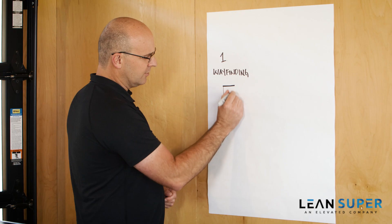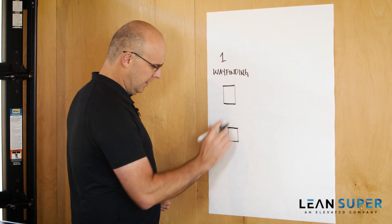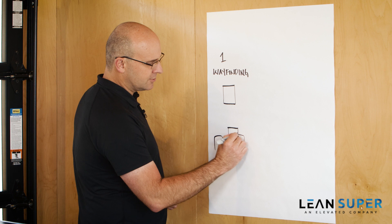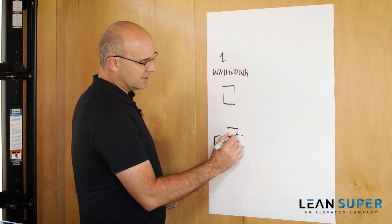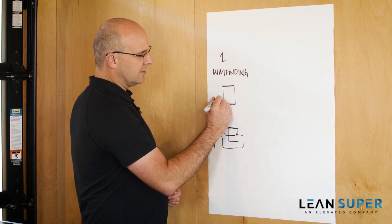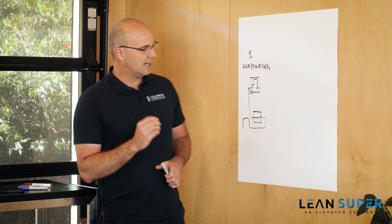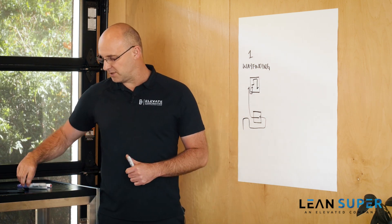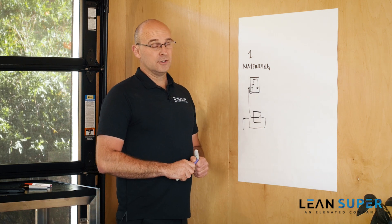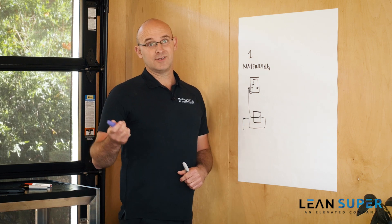The key is to get your workers to the place of work as fast as you can. If you have your job site and then off-site parking, what you need to do in this logistics drawing is to understand what kind of signage is going to get people to the parking lot, what kind of signage is going to get them to the job site, what kind of signs would they need to see, what kind of signage will get them into the trailer to the orientation and then around the project. So that's the key. How do I get workers to where they're going as fast as possible? And I always recommend having signs like airports. Could you imagine if airports looked like our construction projects? Nobody would know where the gates are, where they're going, what's going on, when things are happening. It would be utter chaos.